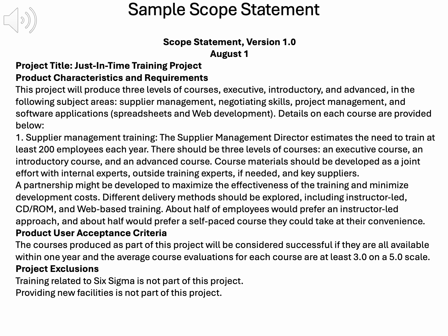Deliverables include project management documents, like the project charter and WBS, and product-related outputs, such as a needs assessment survey, research on existing training, partnership agreements, course materials, and a pilot course. Each deliverable is detailed. For example, the survey produces an 8 to 10-page report and presentation, ensuring clarity.